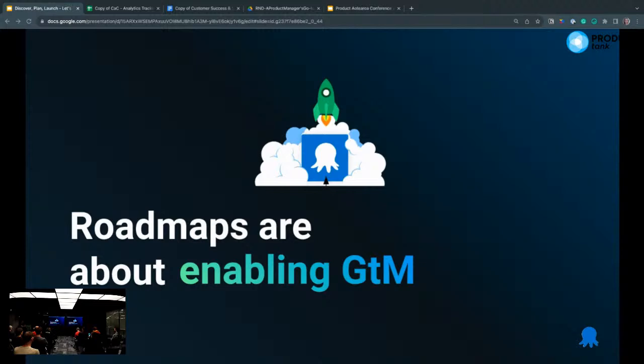So at Octopus, it's less about building Gantt charts and precision, but our timeline-based roadmaps have quarterly granularity, so our marketing organization can prepare launch announcements. And more on that is coming up next from Ships. Thank you.